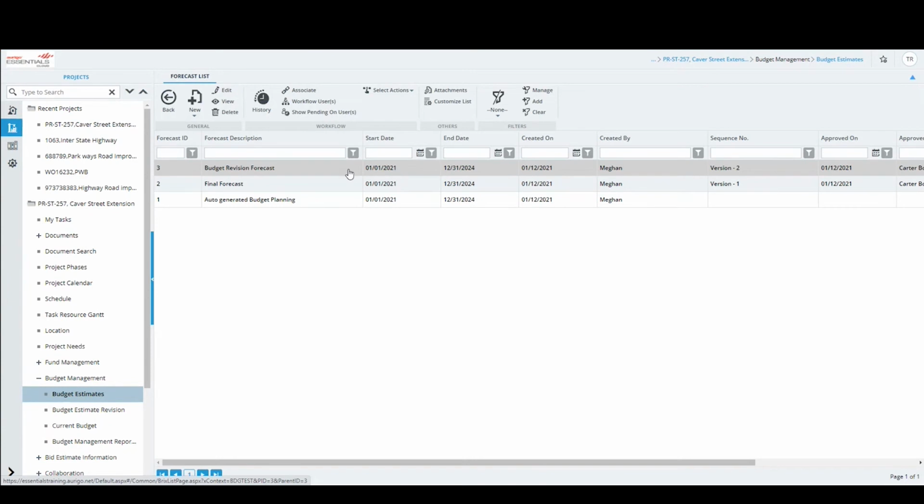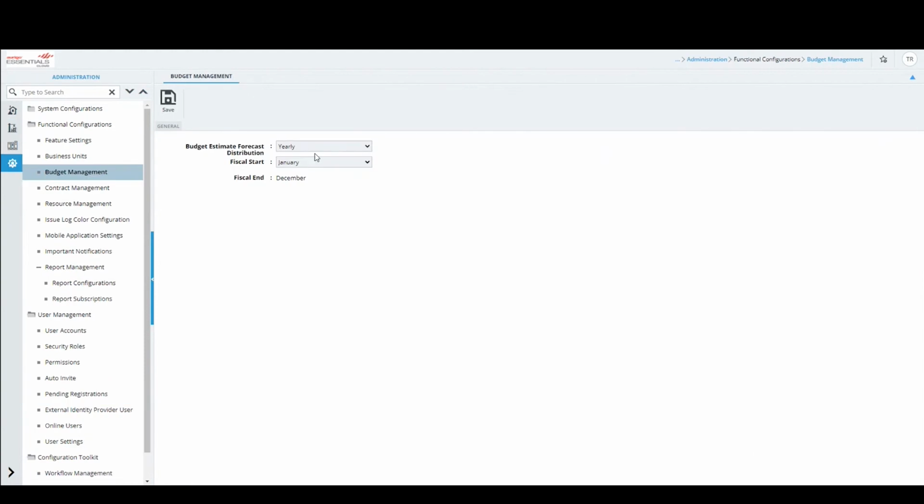So in this case, if I'm creating a forecast, that forecast would spread out for this entire 3-year duration. Each year will have a linear spread of budget allocated for that year. So when that happens, if you want to see how it is spread out, do you want that linear distribution to be spread out on a yearly basis or on a monthly basis? Right now it says yearly. And if I say January, then that spread is from January to December 2021, 2022, 2023, 2024.